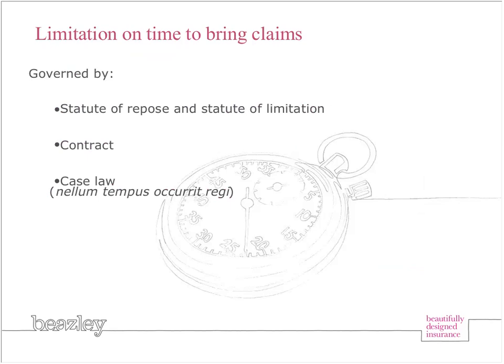Statutes of repose are state statutes that protect design professionals because they set a maximum time that claims can be brought against you. They're in your benefit. It's a good thing to have statutes of repose. The time clock starts to tick from a fixed point on a project, and usually it's substantial completion or the date of occupancy. These statutes are different in all the states.